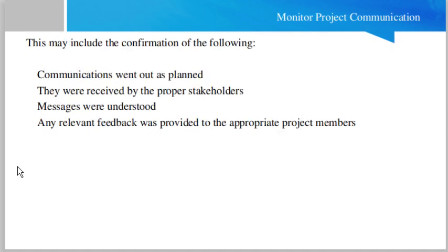Then monitor project communication. This may include confirmation of the following: communication went out as per the plan, the messages were received by the proper stakeholders, messages were properly understood by the stakeholders, and any relevant feedback was provided to the appropriate project team members. So this is also very important for the monitoring of project communication.